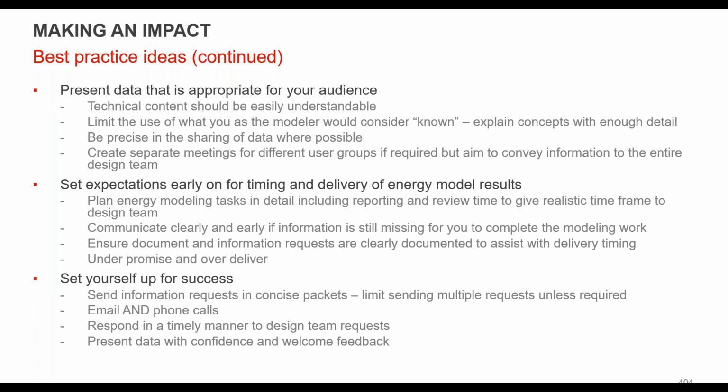Again, set expectations for delivery and timing and schedules, very important. And this is getting a little more outside of just modeling in general, but when you're doing information requests, and I've been on both sides of this, don't send multiple requests for things. A lot of times you'll get a good response the first 2 or 3 times you ask for something, and then after that, people will get frustrated. So if you package them together, it's usually easy to get a good response from people.